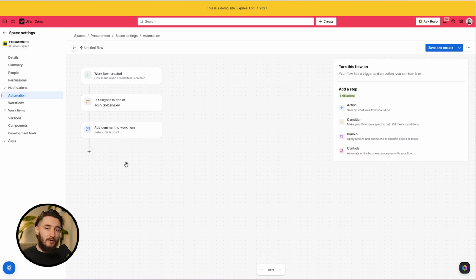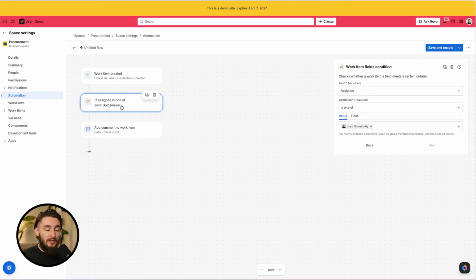And unless you're essentially on the enterprise level of Jira, you're going to have a limited amount of automations that you can run. And when you don't take an action, it doesn't count as an automation. So adding in conditions when you need to essentially save some automation counts is going to allow you to save some of those limits and use them throughout the month before they actually run out. So use those wherever you can to make sure you're not eating up your limit entirely.